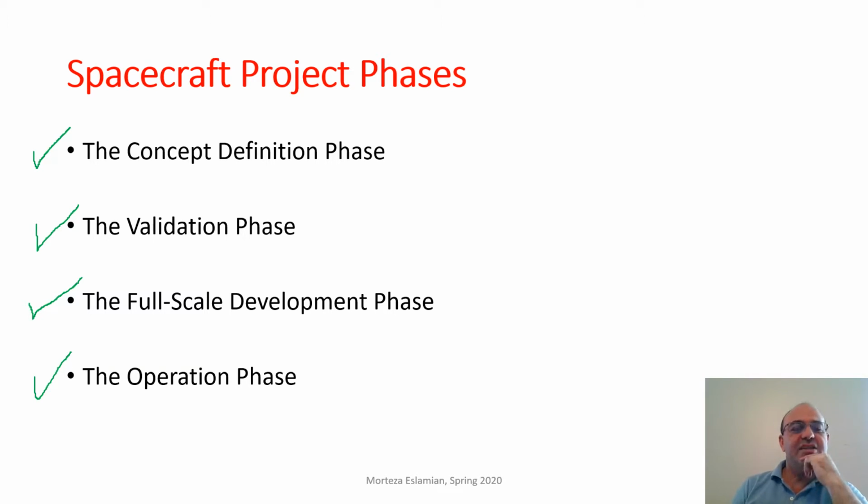We also should pay attention that not all of these phases are necessarily followed accurately, one by one. It depends on the size of the institution or company performing the project. Oftentimes, in startup companies, because of limited resources, the concept definition phase may be very short or done differently, or the validation phase may be combined with the concept definition phase.